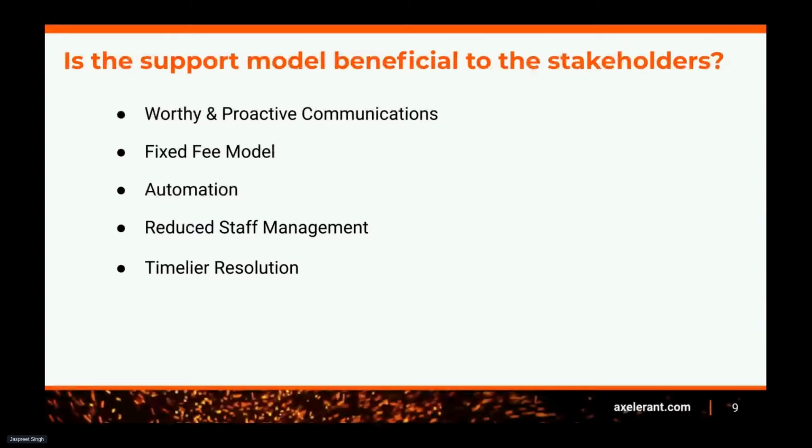Timely resolution. If the SLA, service level agreement, is all set and updated in the SOW contract, then all things will work according to those terms. Let's suppose the client says that if the bug priority is very high, or the uptime or downtime issues priority is very high, the response time should be 2 hours and the resolution time should be 8 hours. That is the kind of SLA you are supposed to set with the client while signing the contract of the support and maintenance model. So the timely resolution comes under this SLA process as well.